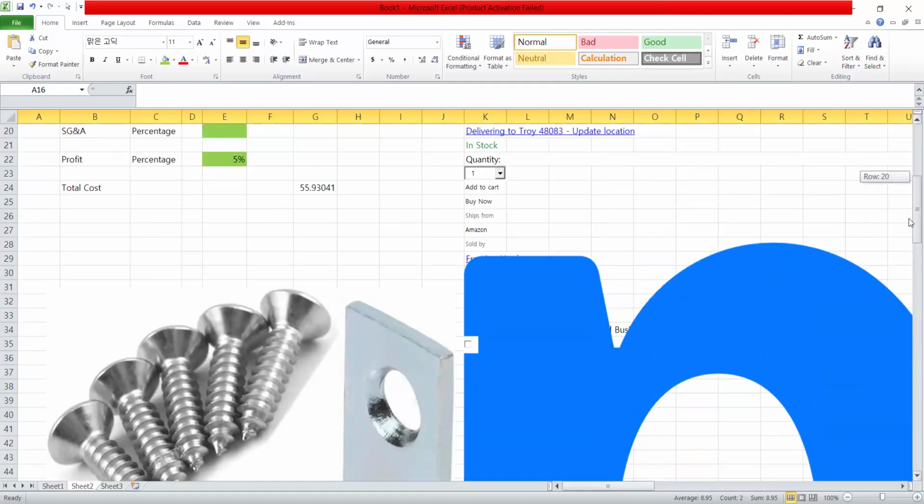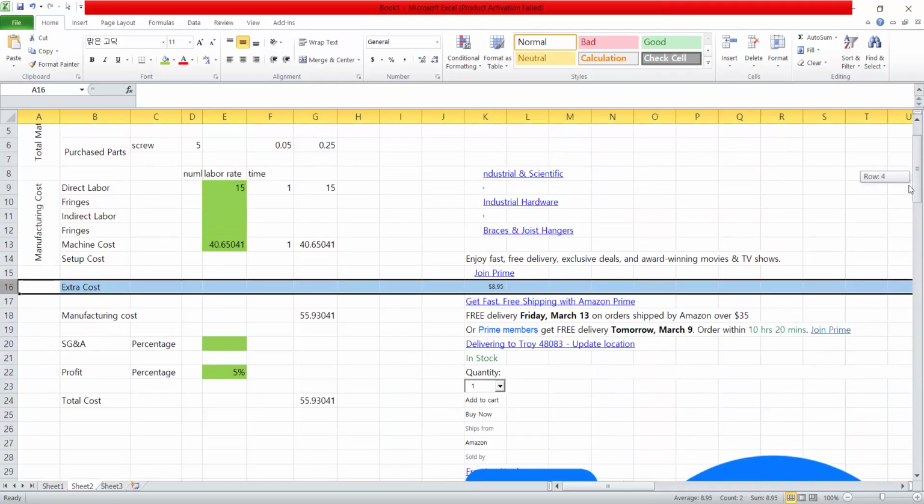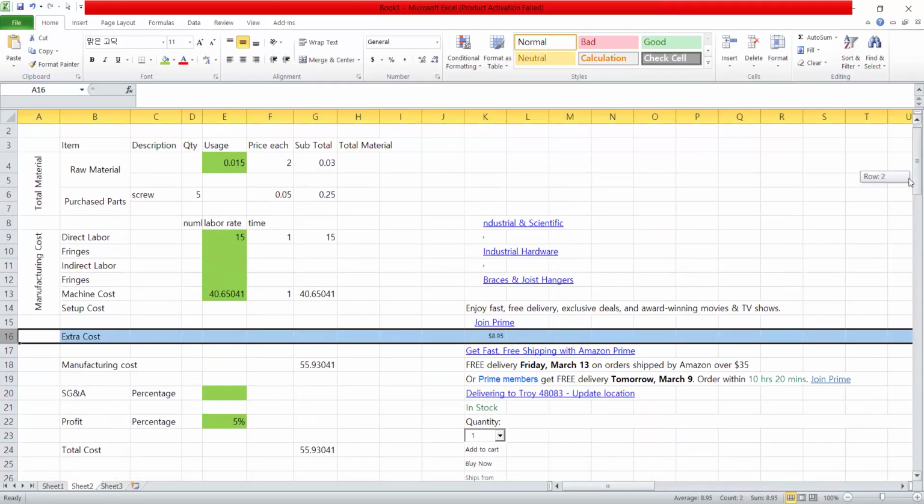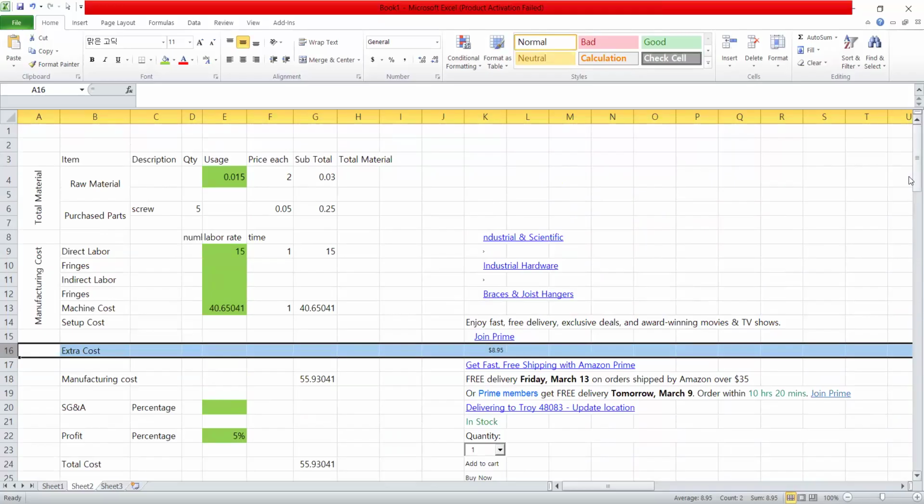Then you can consider one scrap. Then you do the punch hole. Sometimes all three operations are in one. Then you put 1 to 3% scrap in your manufacturing cost in order to develop this costing for your product. So this is a very good tool that you guys are learning. Trust me, it will make you a stronger engineer.